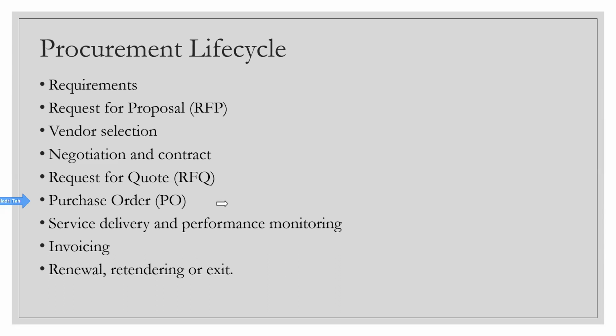Delivery TPMs who are dealing with day ones and the day twos for some time, let's say 6 months to 1 year, for them it will not take, in fact, more than half an hour to 45 minutes to vet one code. I'm talking about active hardware. Similarly, probably half an hour to 45 minutes to vet one passive hardware code. For audio video, yes, it may take a little bit more time because AV has got a lot of other components and they are high value. So you have to check them a bit carefully and find out if the AV components are matching.